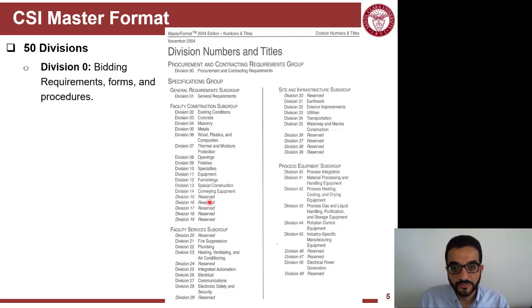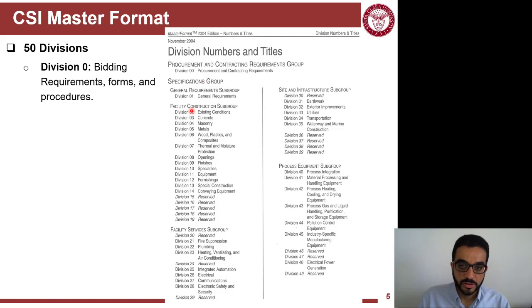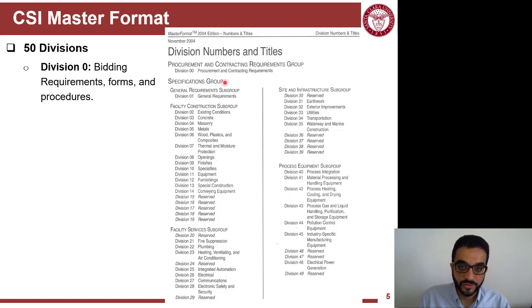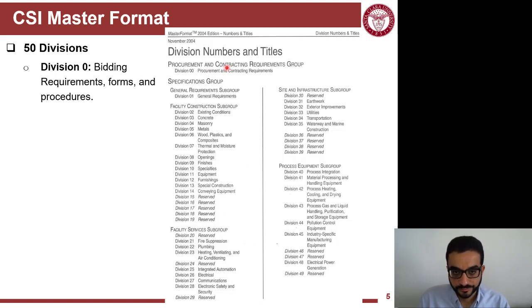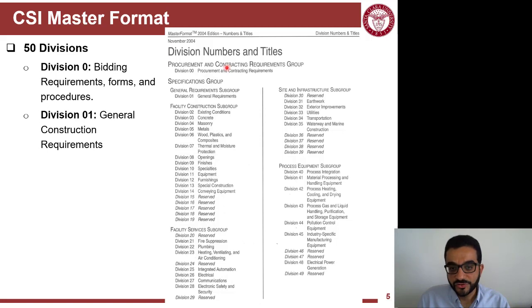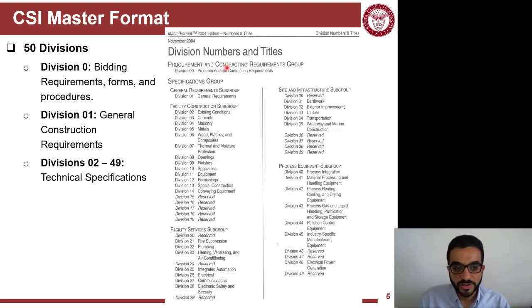Division zero covers the bidding requirements, or procurement and contracting requirements. So when the project is released in the bid package, this is where you'll find the bid instructions. Next is Division 1, which is the general requirements. And then the technical requirements are Division 2 all the way to 49.